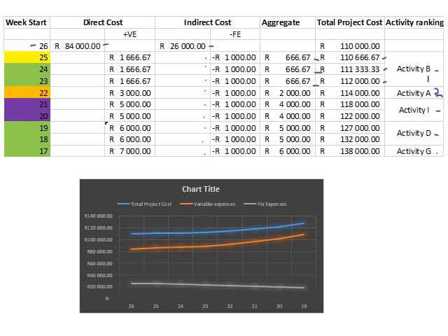So then if you look at reduction to 25 weeks, you can see, okay, there's a 666 Rand that's added to the project by reducing it with 1 week, so that's still fairly fine. And then we've got another week of the same addition, and the third week we've got the same addition. And then we've got an addition of 2,000 Rand here.